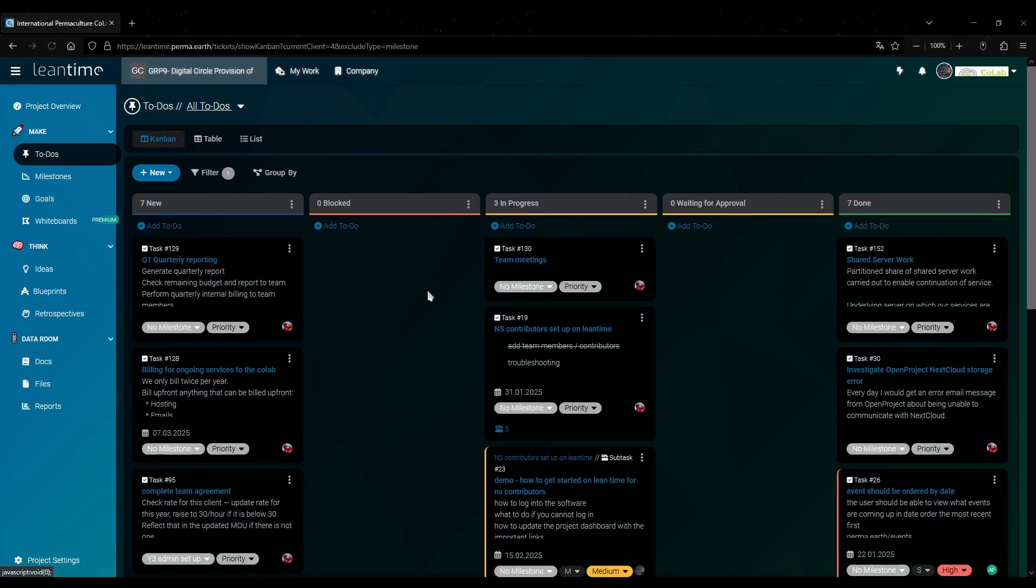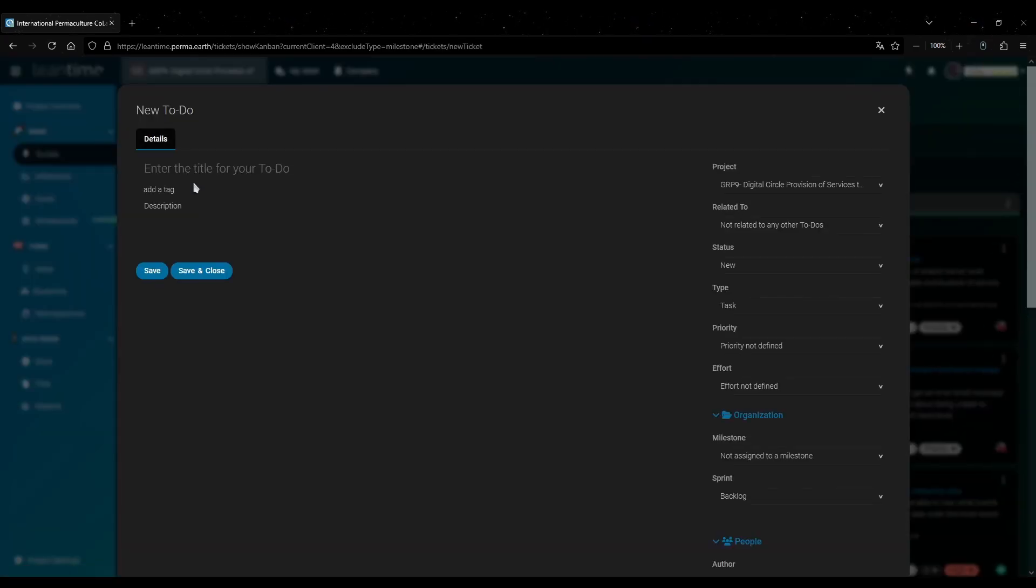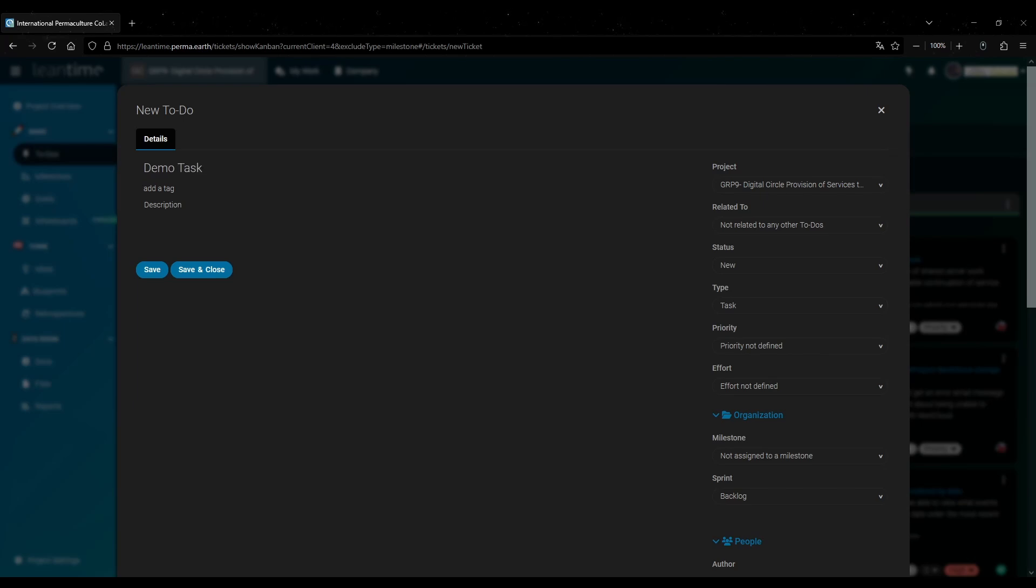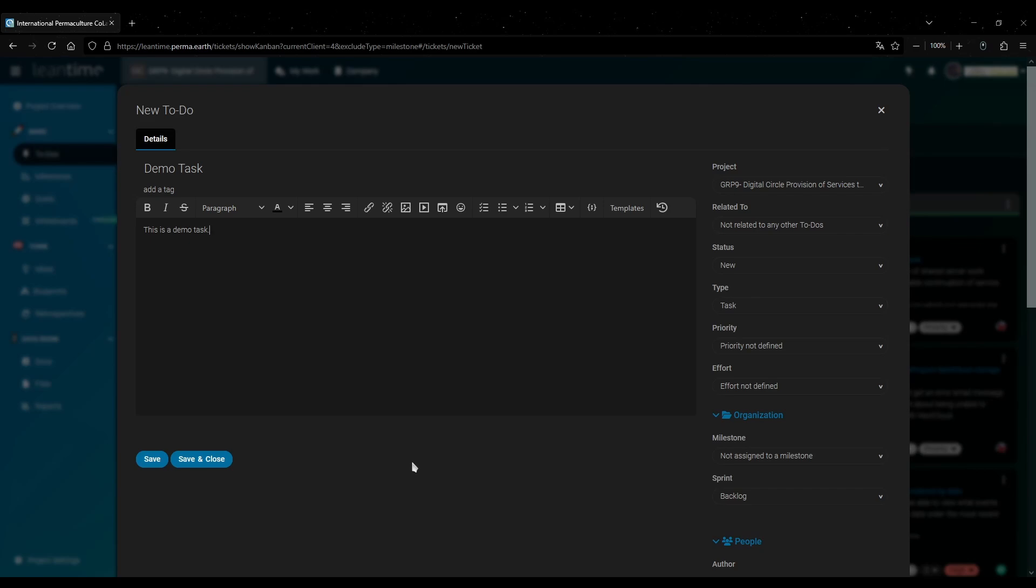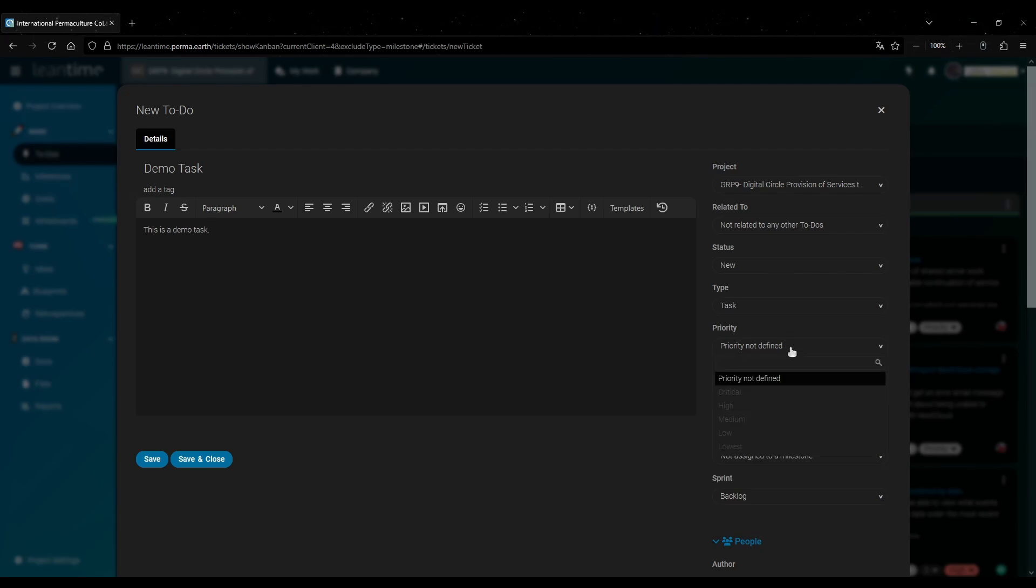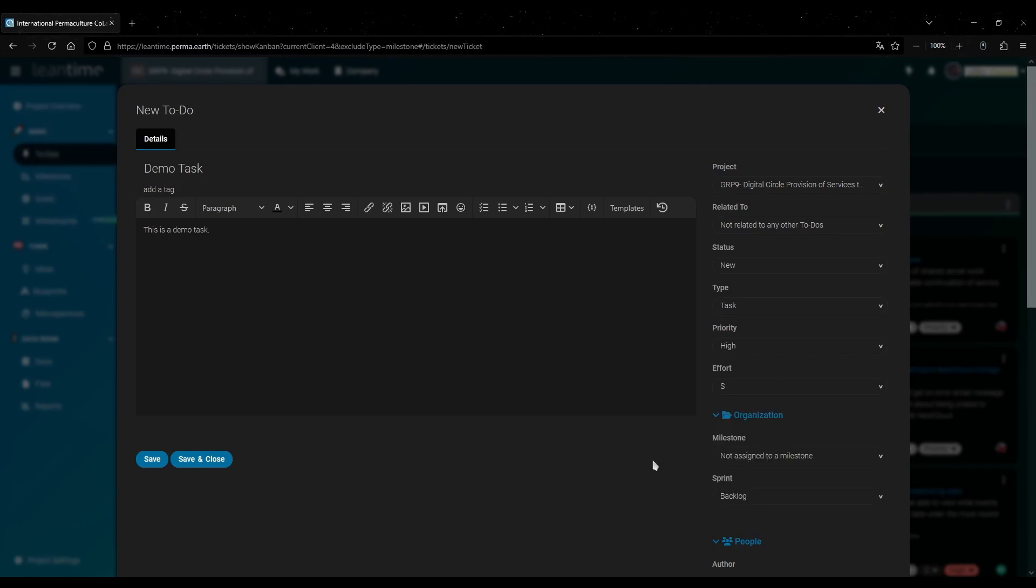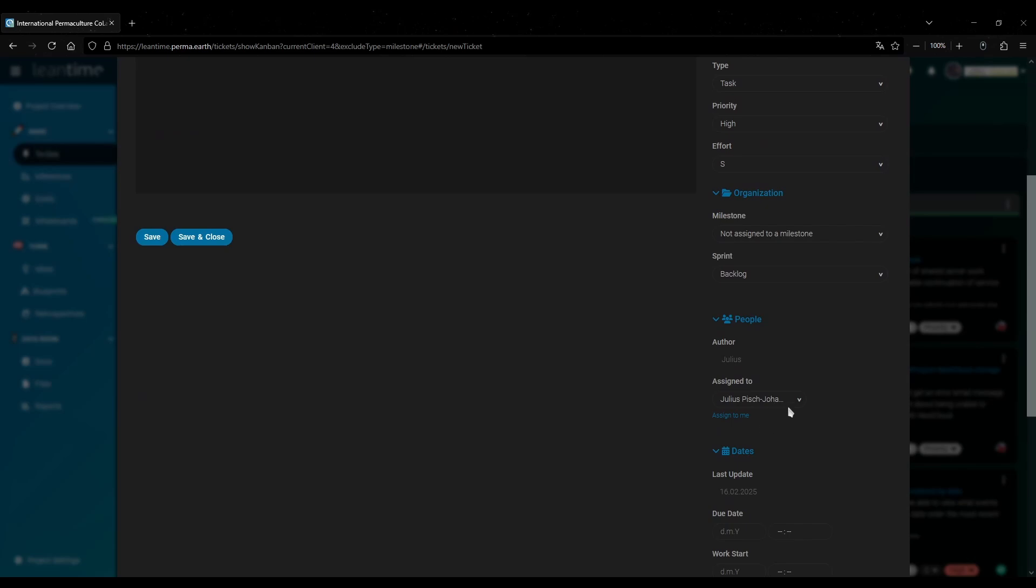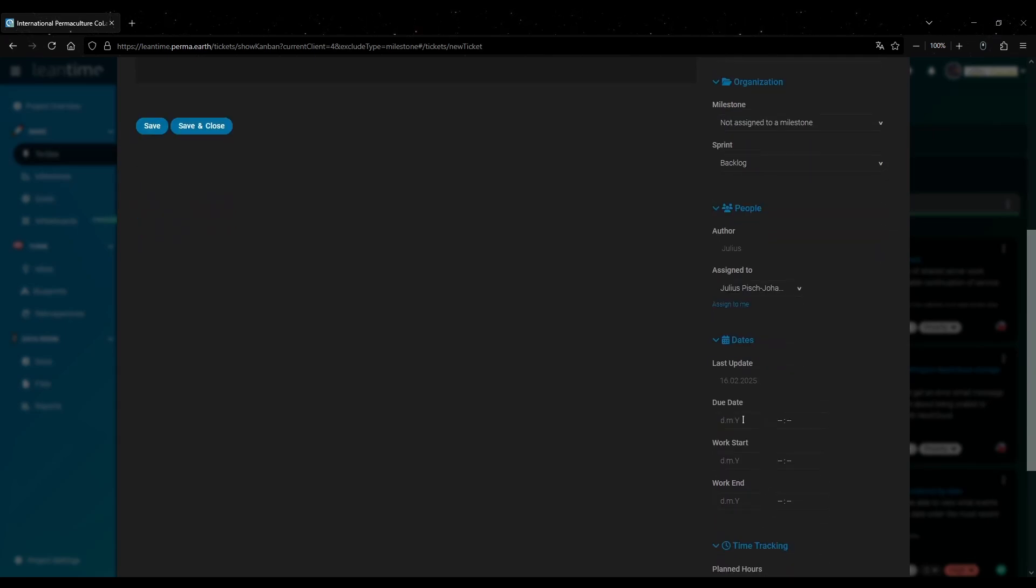To create a new to-do you click on new and then to-do. That will give you this window where you can enter a title for your to-do and a description. And just like the project settings you also have a bunch of options on the right here. For example you can give this task a priority or set how much work is required for this task. If you scroll down a bit you can assign this task to someone. By default that's yourself and the dropdown shows you your team members.